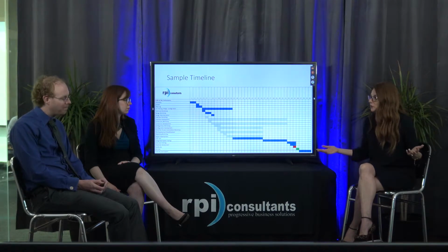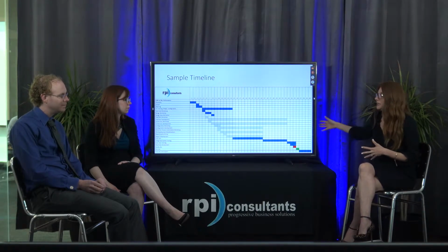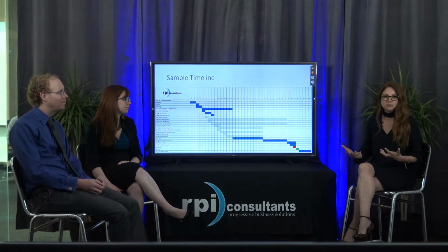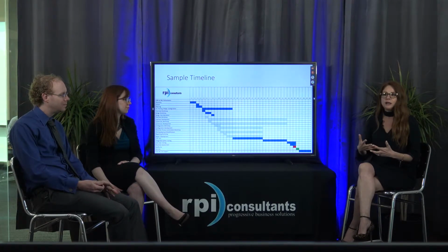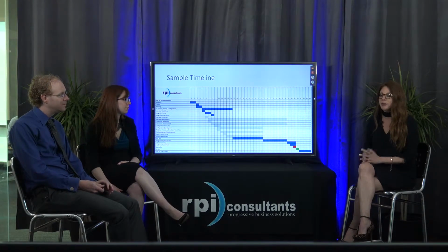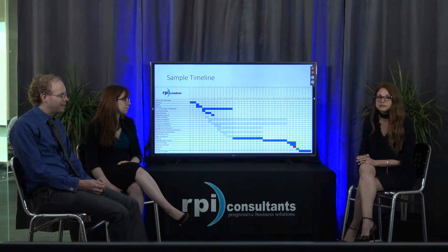So you could have 20,000 employees and still be at this 9-month, or you can have 1,200 employees and you can be at 15 months. And then it's really what your workforce looks like, a lot of the different rules you may have around your processes. All of those play into what that final recommended timeline looks like.